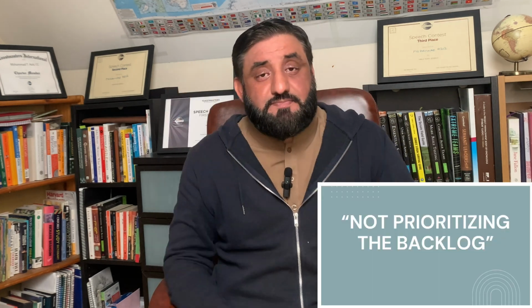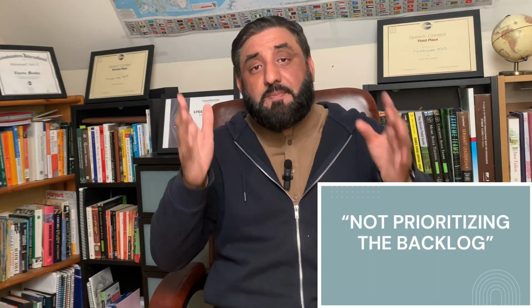Number 6, not prioritizing your backlog. There's a really exciting quote I read in one of the books fairly recently, where it was saying that by not prioritizing your features, by not prioritizing your backlog, you are giving the person with the least authority the power to prioritize the backlog for you. Because the most junior person, the most junior developer, is going to go and pick up a user story and start working on that.